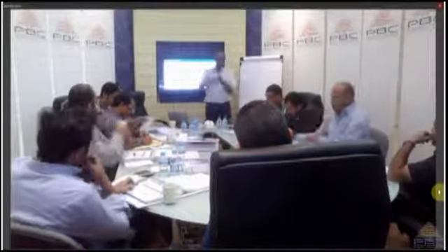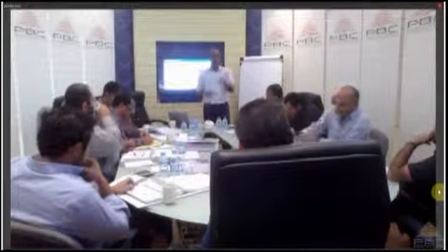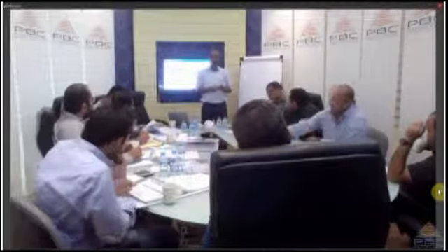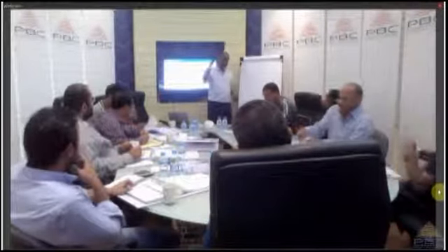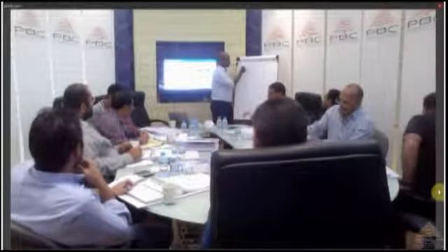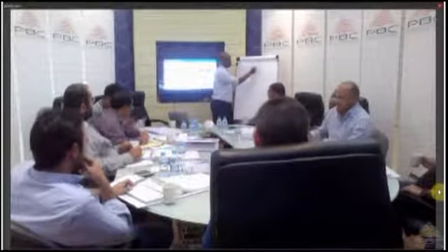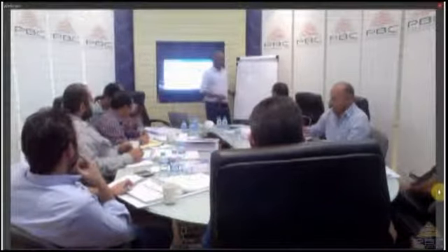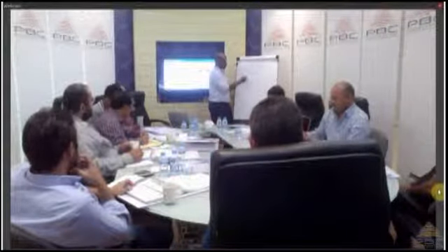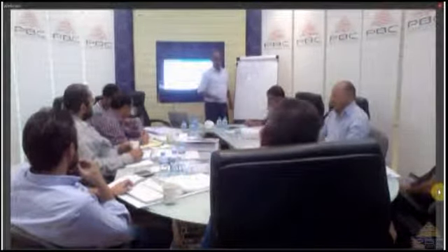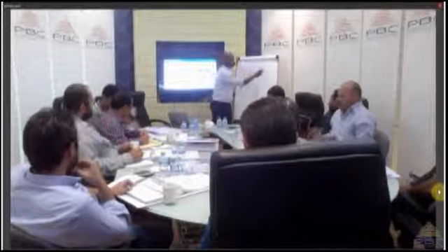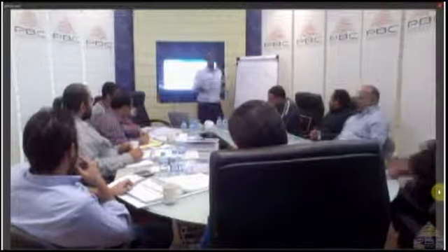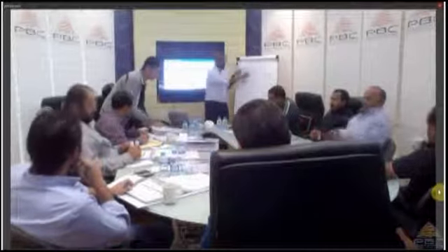Means all the facts or the assumptions you made on which you base your estimates. Sometimes when we work out how much or how long it will take to paint this room, how does the process go in our brains? We need a painter, for example, for 5 days. For these 5 days, the cost per day is $100, for example. So the activity of painting the room will cost how much? $500, for example, including all the resources and so on.